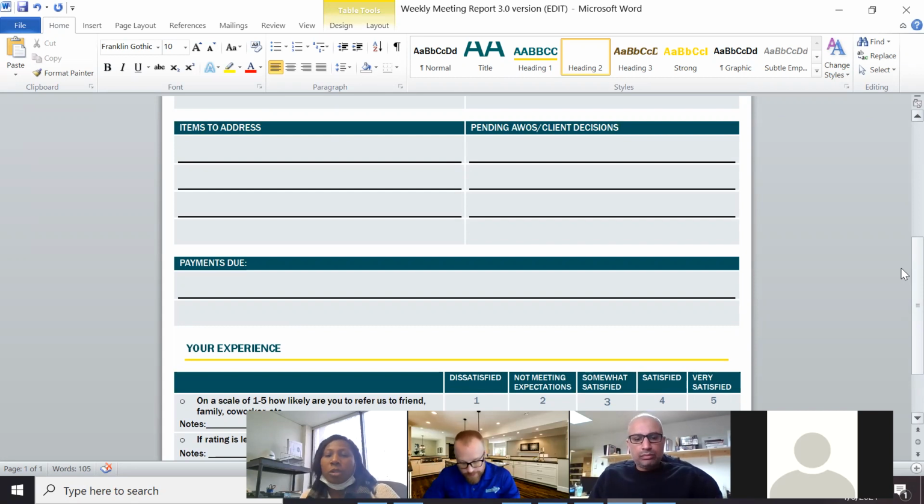They know what to do when the client's approved. They go approve it. They know to code it and send it off to Beth, and then also put the coding in the options to contract. This is going to be part of their process. They're going to take that amount, put it in your schedule so that you have it there. So you just want to look at it prior to going to your meeting to make sure it's accurate.